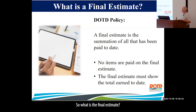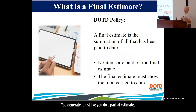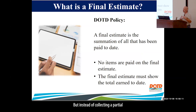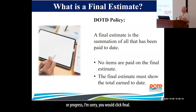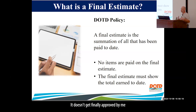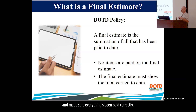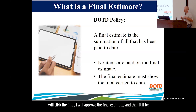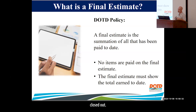A final estimate is a summation of everything that's been paid over the project. You generate it just like you do a partial estimate — instead of clicking partial or progress, you click final. There should be no money on the final. It doesn't get finally approved until we've gone through the audit and made sure everything's been paid correctly. Once everything's been paid correctly, I will approve the final estimate and the project will be closed out.